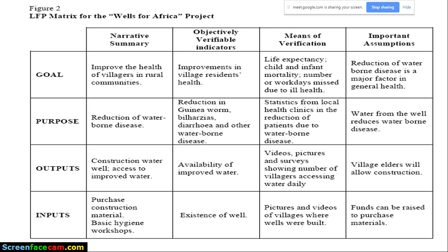But there are times where the activities will come on their own and the inputs will be on their own. That would be good. So you can just create another row at the bottom here, which is going to be inputs. Then where there are inputs, here you put your activities so that you label them. When you talk about money, then it means you need to put in the exact amount that you need as a project for that particular activity.